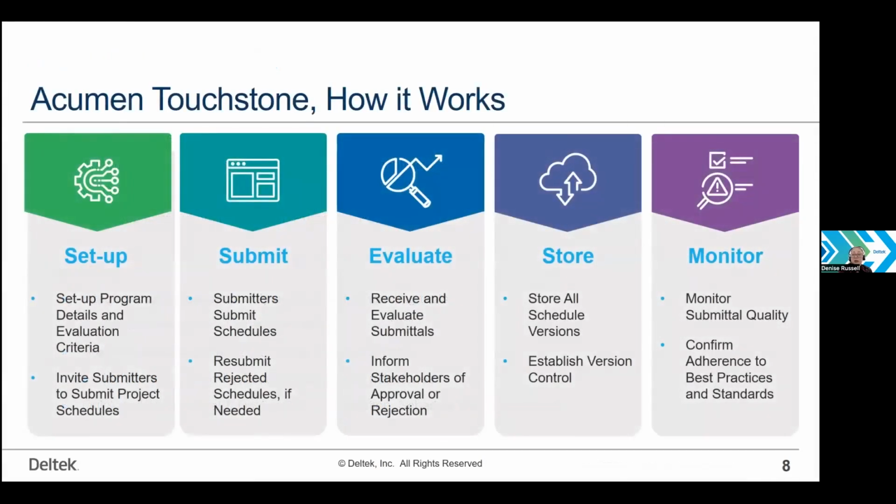What does wraparound mean? So I would be talking about tier 0, tier 1 milestones. Just as an example, I might be on a program where there are 6, 7 major deliverables. Each of those major deliverables might have its own project essentially. And so with the tier 0 and tier 1 milestones, those are the milestones that are going to encompass the entire program.